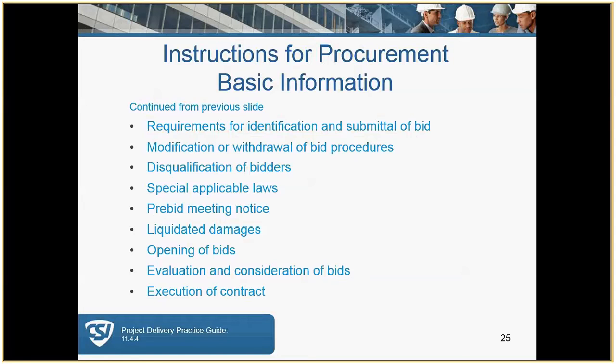And here are some additional examples normally to be included. Keep in mind that all of these are critical instructions that must be followed by the bidders, especially on a publicly funded project in which you cannot allow for any irregularities in the bid. If these instructions are not followed, then the bidder may be deemed non-responsive and the bid disqualified.